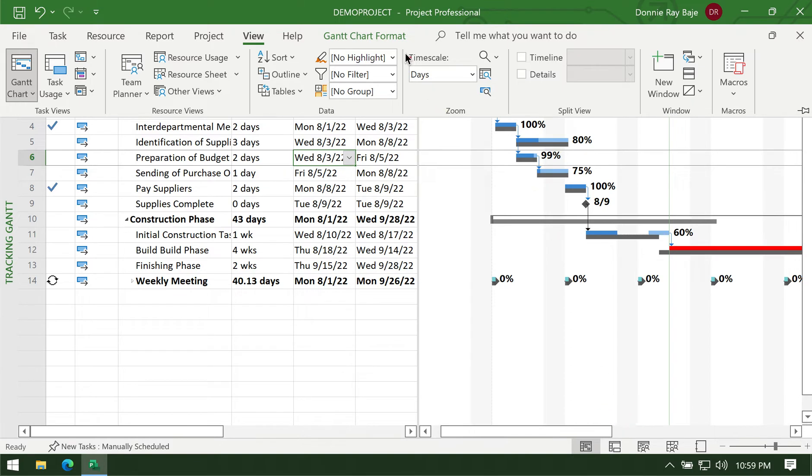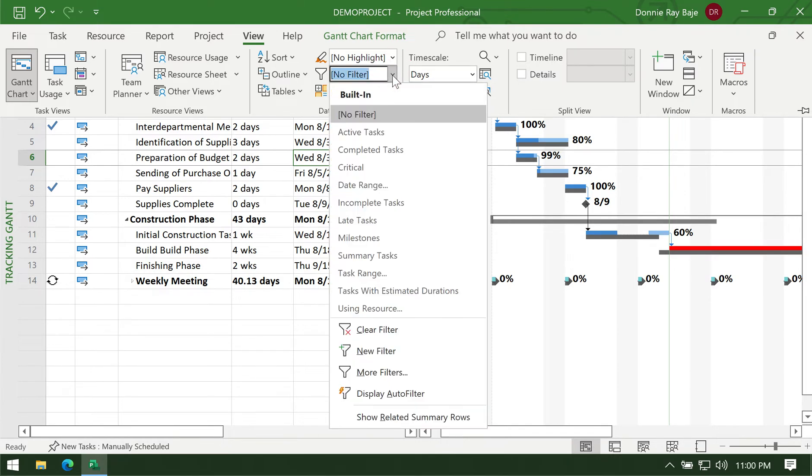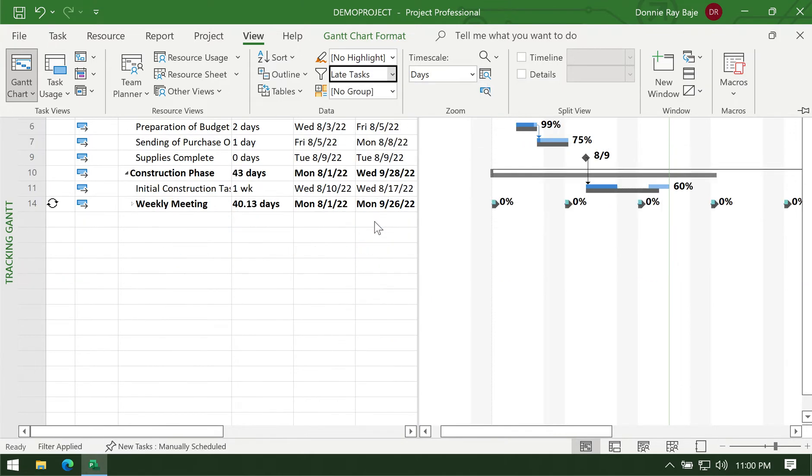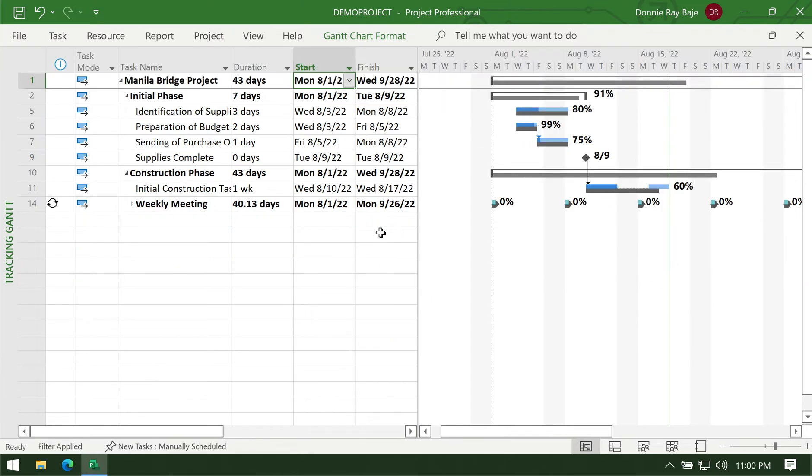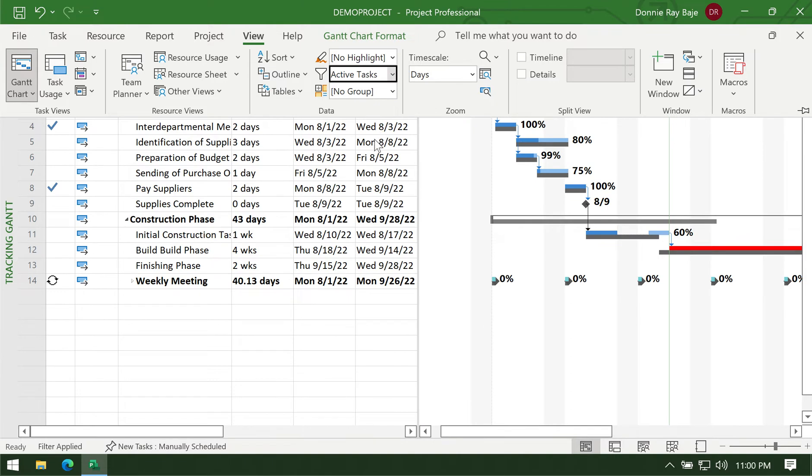This allows us to provide some highlight or filter to your data. For example, we have the filter dropdown here and you can choose several filters. For example, you want to filter those that are late, and MS Project will then hide the tasks that are not late, those tasks that are still on time.